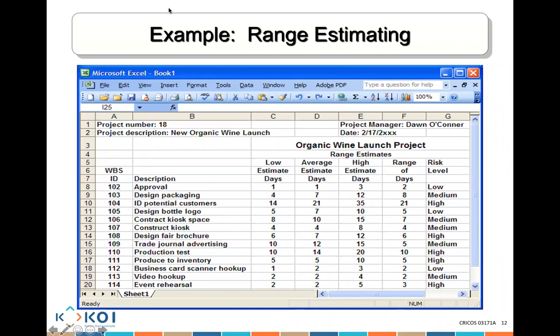Saying this, it is not the approach that is potentially preferred for agile project management, because agile does very minimum upfront estimations. They are basically trying to find a more efficient way to operate. So it really does depend on what sort of project we are talking about. In the agile approach, they prefer a much shorter amount of calculation, in contrast to the traditional approach, where they want much more estimation to be completed. Does that make sense? Yes, sir.